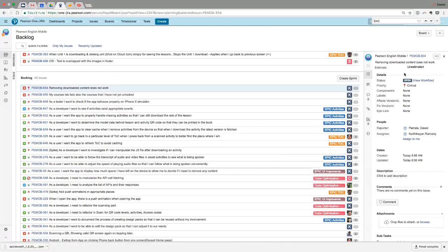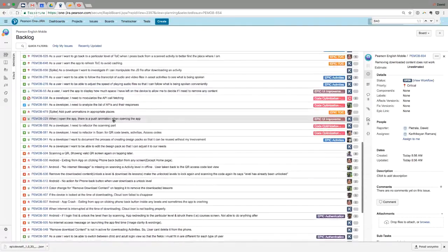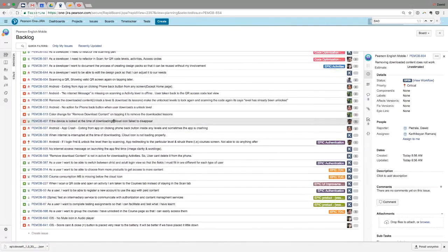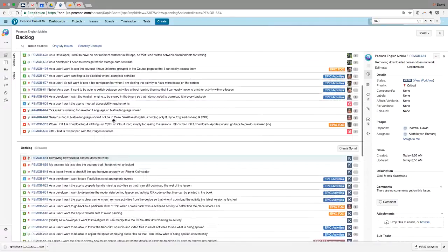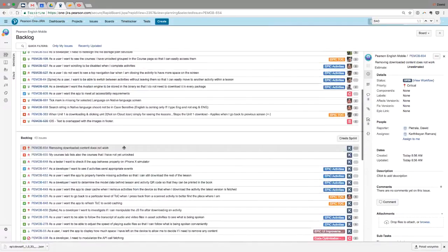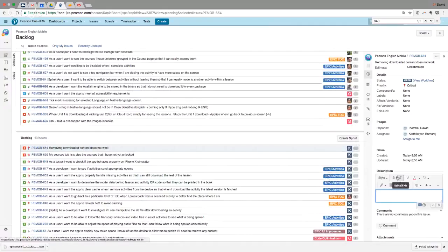Okay, fine. Yes, David, there are 3 more bugs in the backlog which are related to 654. So what the team is suggesting is we will link all those 3 under 654 and add the estimation only for 654. No problem at all. So let's put the links, related to.